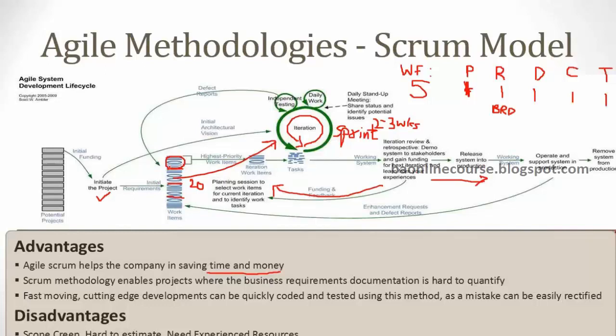So that's a major thing. You're not doing all the requirements and everything one after the other. You're doing that in smaller batches. We call them sprints. In a way, it is similar to the iterative model, but there are a lot of differences between iterations and the Scrum model. In iteration, you are saying one module, one phase, and then doing it. But here, the requirements themselves are prioritized, and the requirements could be across different modules.